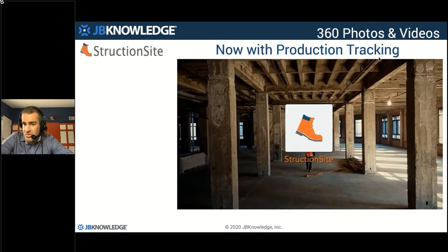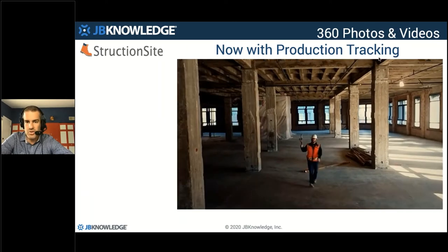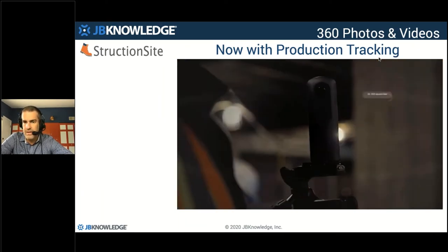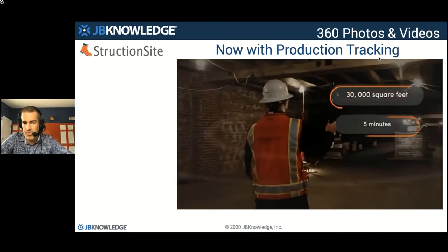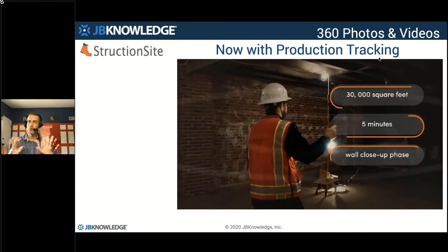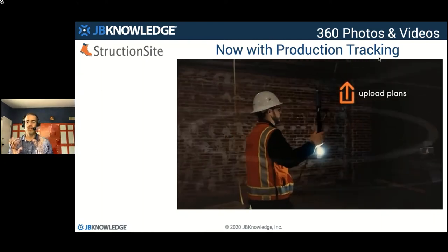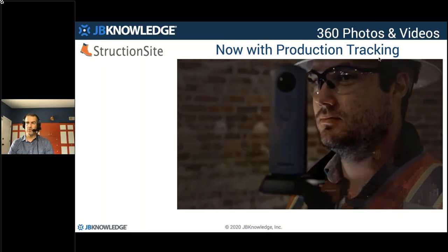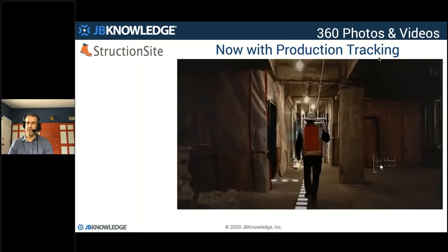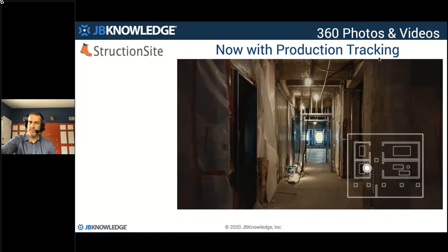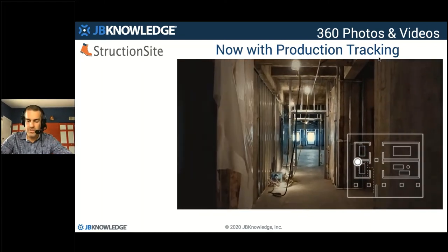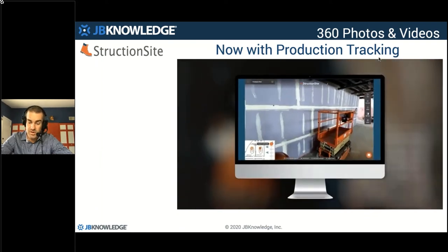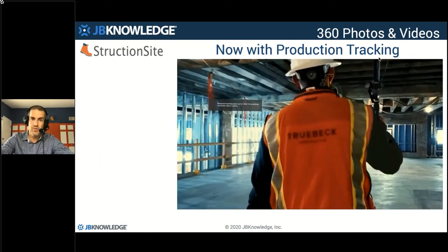You can even do production tracking. Now this is the example I wanted to show you of a construction site where they're actually holding it above their head, turning it on in video mode. This now tracks production rates. So only on framing and sheetrock for now. So it's particularly useful for commercial construction, but it does measure production rates and allow you to track what's being installed and what percentage. You know, it's not going to measure productivity, but it is going to measure production, which is a really useful tool.